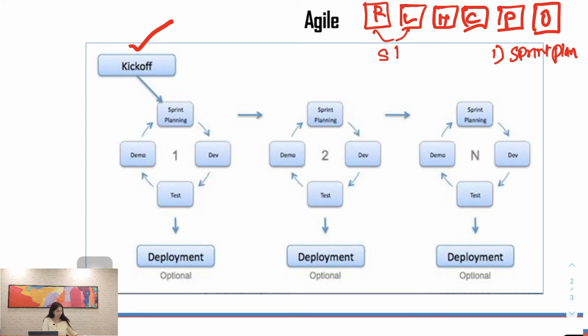The second meeting is the daily stand-up Scrum meeting. These meetings happen every day in the morning, for 15 minutes. They are called Scrum meetings because these meetings are meant to be short. Here only 3 agendas are discussed. Number 1, what did they do yesterday?